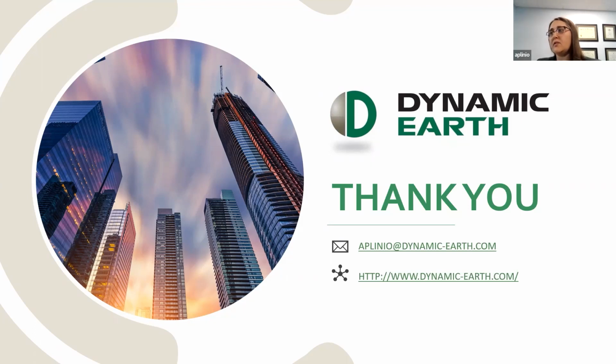And then it was just kind of based on availability. This job was installed in 2021 when steel was a little bit difficult to get. And so the availability of this 18-inch diameter, 0.5-inch thick casing just happened to work out really well. And that's what the contractor wanted to use. We probably could have sized down a little bit, but between making sure we hit that lateral load and availability of material were our real governing factors.